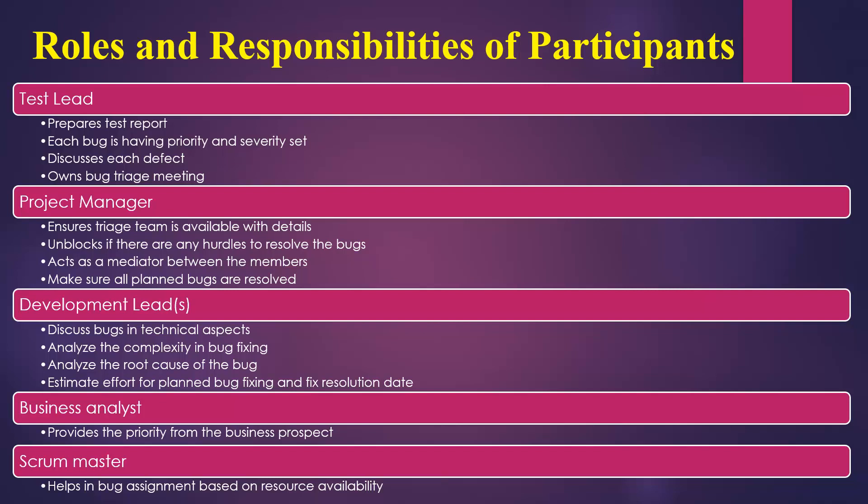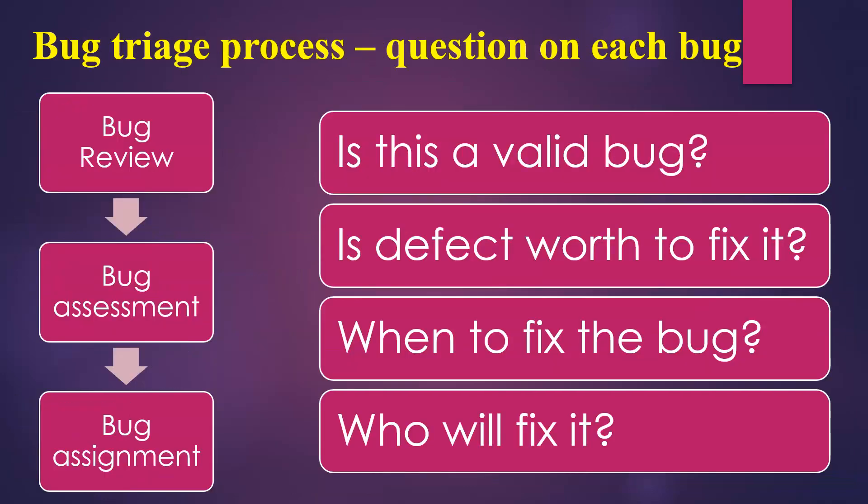The business analyst reviews all the bugs and determines which ones take higher priority based on business value — which bug, when fixed, will most benefit the business. If you are in an agile team, you will also have a scrum master, who helps in bug assignment based on resource availability.